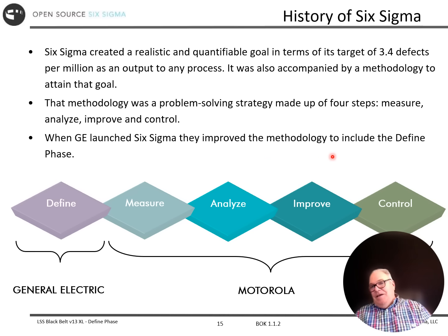And thus the other toll gates, the other milestones here, help to make sure we launch the right one. So if we get to the measure phase and we find out that it's not really the return that we expected, we go back and we pull another one out, and we bring that one forward.